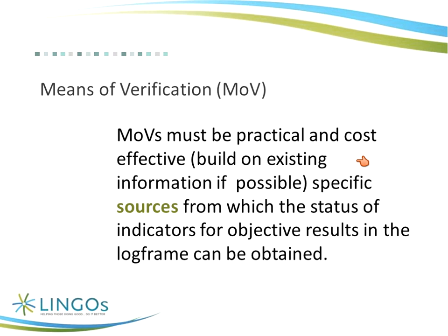So if you're going to put that into a log frame, you have to make sure that you've got the budget to do it, the resources, people, all of that. So it must be practical, cost-effective, building on existing information. Wherever there is information that exists that is reliable, you should use it. Don't measure if you don't have to.